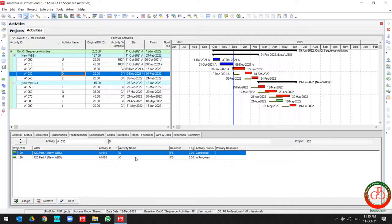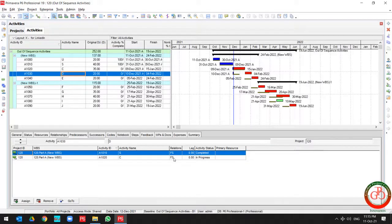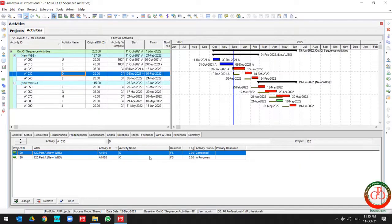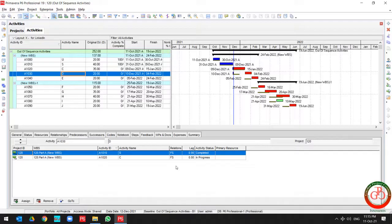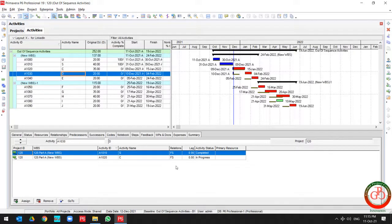But as you see, task C is in progress, but according to this relationship type, this task should be started by finish-to-start relationship. But right now we have two tasks with a start-to-start relationship, so this task will be out of sequence.